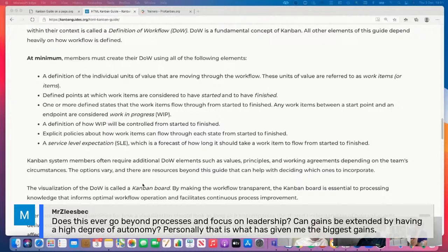Work item aging is crucial, of course, but really understanding what your workflow is, what the steps in your process are, where does work start, where does it finish? In a lot of cases, you could have multiple start points and multiple end points, and that's completely okay. Which means you have multiple WIP definitions and multiple throughputs.